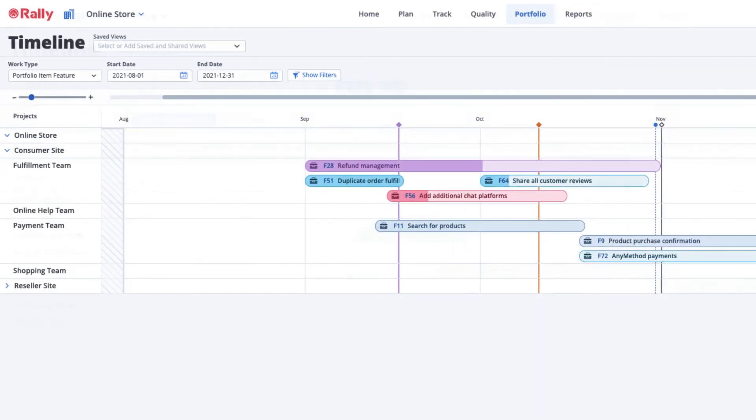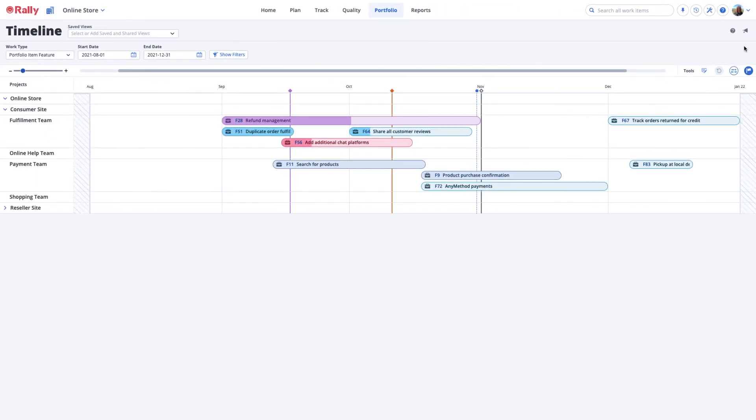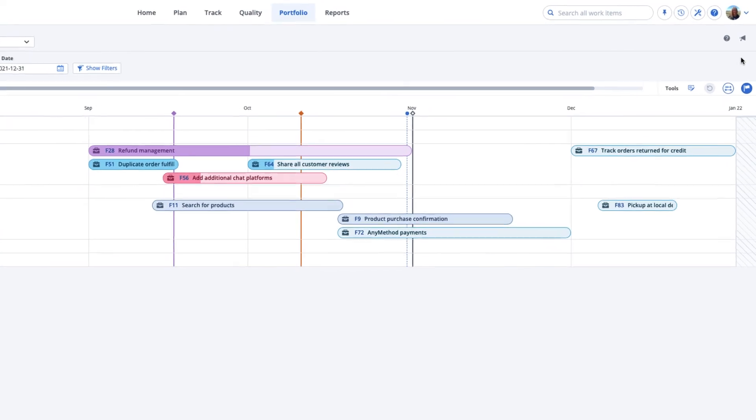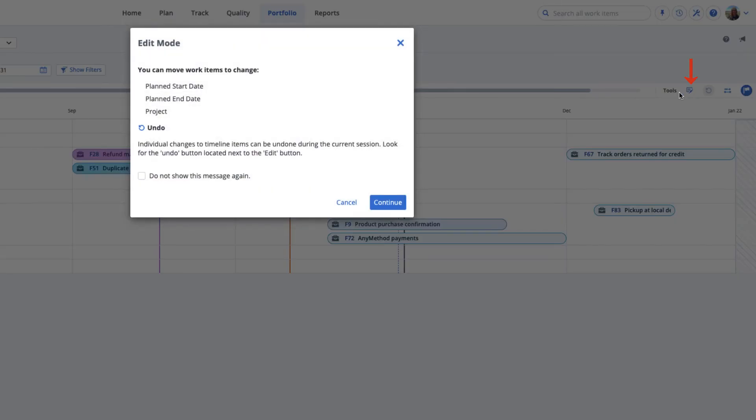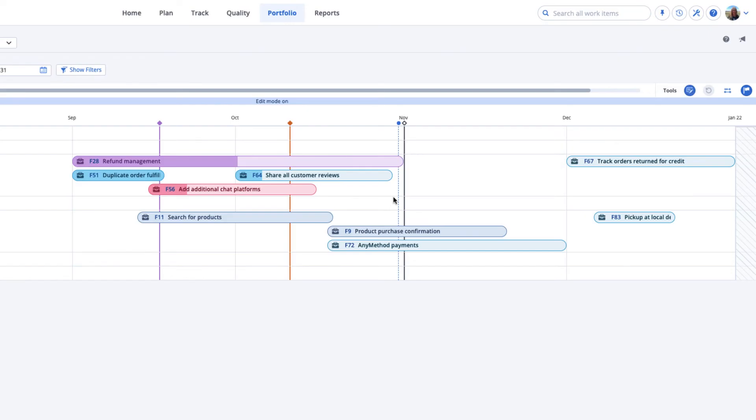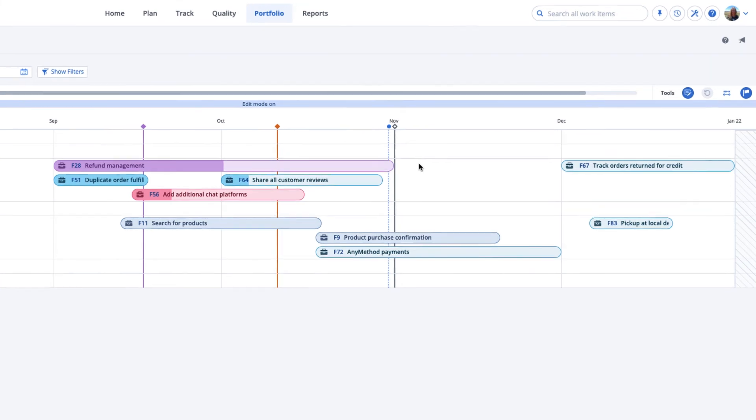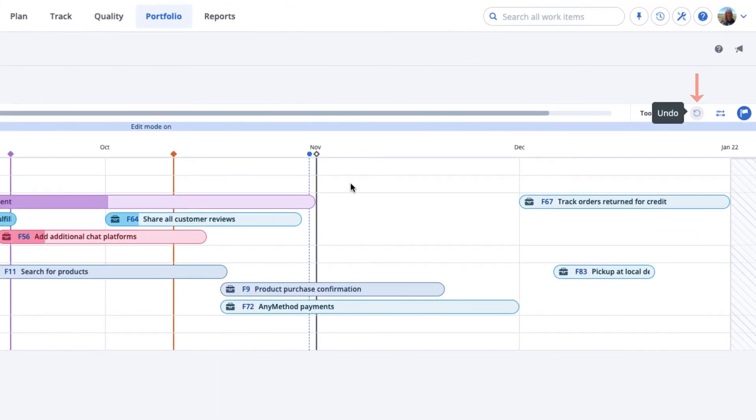When you change a Portfolio Item on the Timeline page, updates are saved automatically and without a confirmation message. Select Edit Mode to switch between Edit Mode and View Only Mode. You'll see an indicator when Edit Mode is turned on. Until you navigate to a different page or log off, you can revert your most recent changes by selecting the Undo icon. This is helpful when you're using the timeline in a steering meeting, making changes in real time.